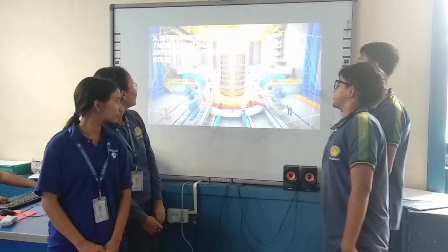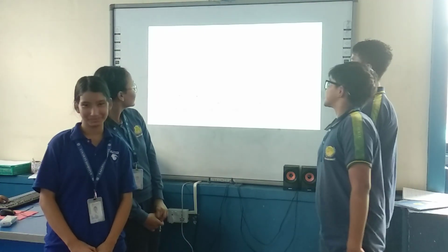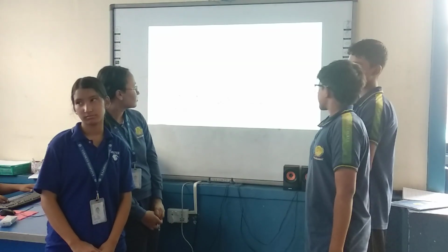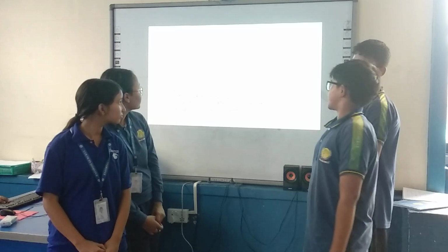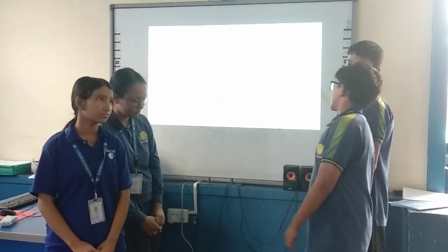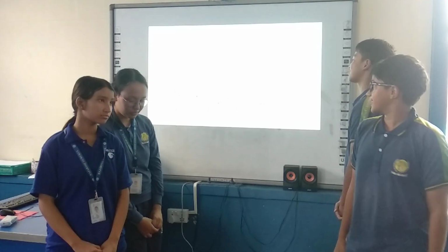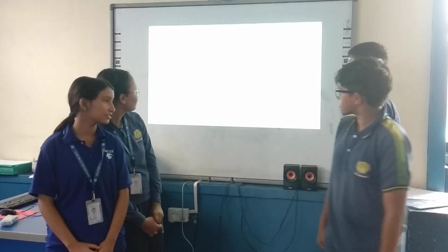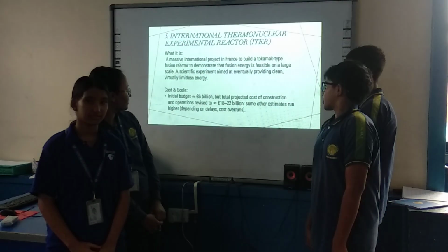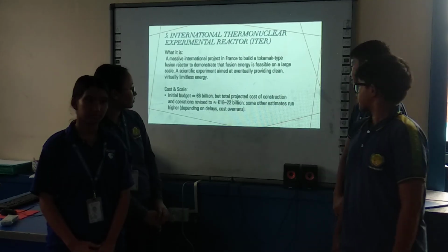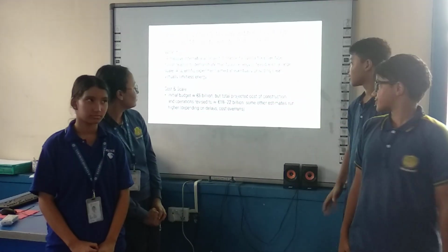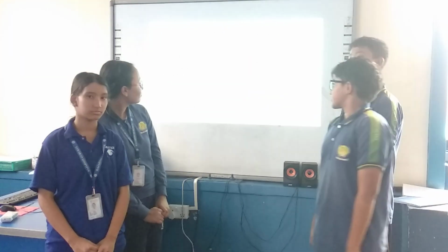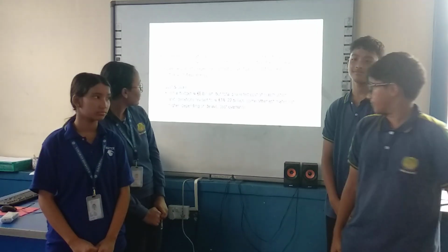International Thermonuclear Experimental Reactor (ITER). It is a massive international project in France to build a tokamak-type fusion reactor to demonstrate that fusion energy is feasible on a large scale. A scientific experiment aimed at eventually providing clean, virtually limitless energy. Initial budget 6 billion euros, but total projected cost of construction and operation revised to 18 to 22 billion euros. Some other estimates run higher depending on delays and cost overruns.